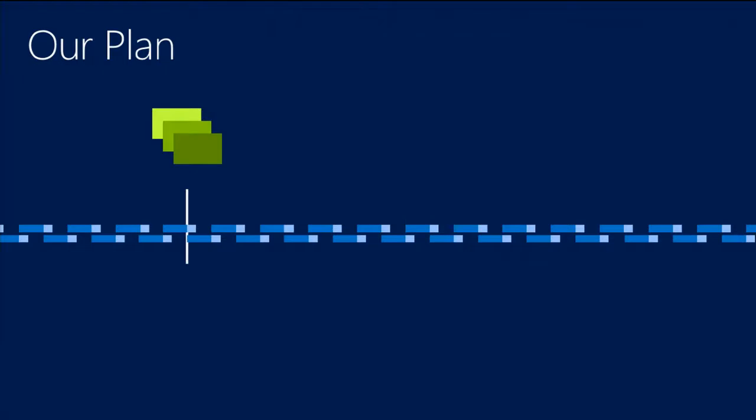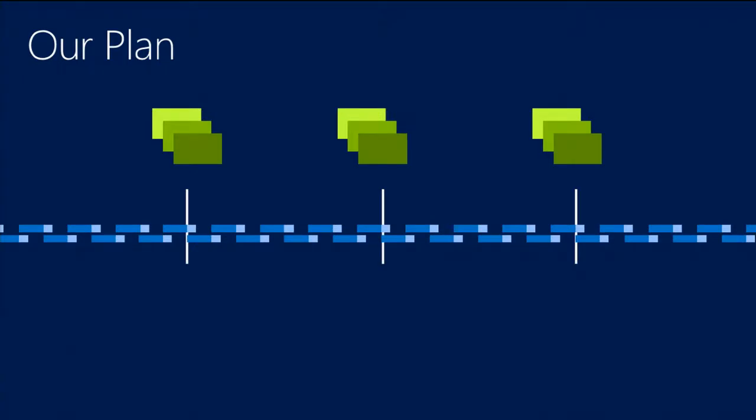Okay, how do we do planning? Got about 10 minutes left here, so I'm going to keep moving. We break the year up into 6-month chunks, and we call those seasons. We have a spring and a fall, okay? A lot of people start laughing because they're like, you guys live in Seattle, right? That's the way it is anyway, right? Summer shows up on July 4th, and then the leaves fall on July 6th. So January 1st to the end of June is what we call the spring time period. July 1st to the end of the year is the fall period. We think in 6-month chunks.